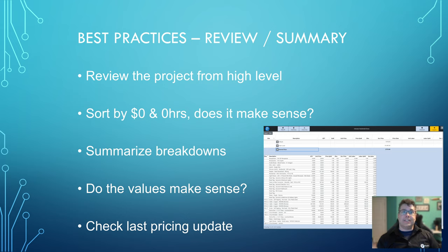Now, this is a little bit of a murkier part there on the hours. It really depends on the labor you're using. For example, if you're using the NECA labor manual, it will have fundamentally different assumptions than the Suderman labor manual. If you're on the mechanical side of things, if you're using the NAPHCC manual, wildly different from the MCA manual. So understanding the foundation of the labor that you're using is absolutely critical, because not everything necessarily should be labored.